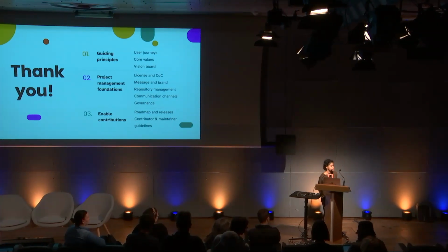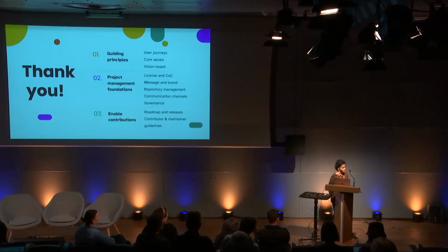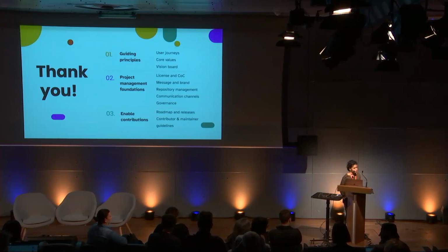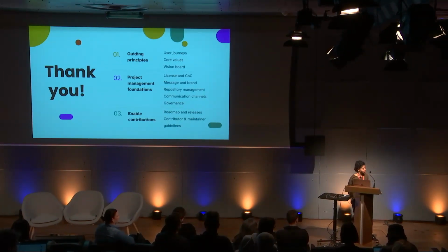When you start, it's probably going to be your core team. But what we try to do is review in the open regularly, like in a community meeting, so that folks have an opportunity to share feedback and add to the roadmap. So when you refresh the roadmap each time, make sure it's in the open and folks get a chance to share their thoughts. The roadmap itself is probably hosted somewhere, so we have it on GitHub, so folks can also open issues against it to say, hey, this is another thing you should focus on.